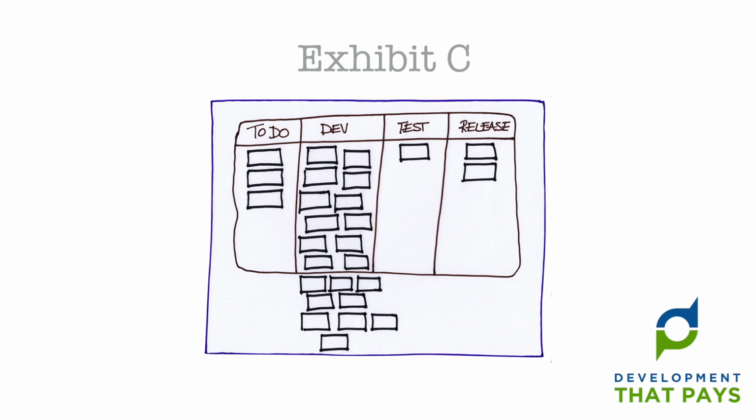It's likely that many of the cards in this column are blocked, which is a symptom of starting development work on a task too early. This team might benefit from a little more design work before they jump in to dev.